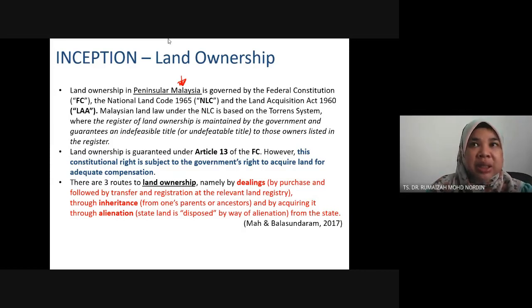However, the requirements differ, because in Sabah and Sarawak we have various ethnic groups, and the ethnic heads hold much power. Whatever decision needs to go through them, and most of the land in Sabah and Sarawak is native customary land, so they have to go through the leader of the tribe.